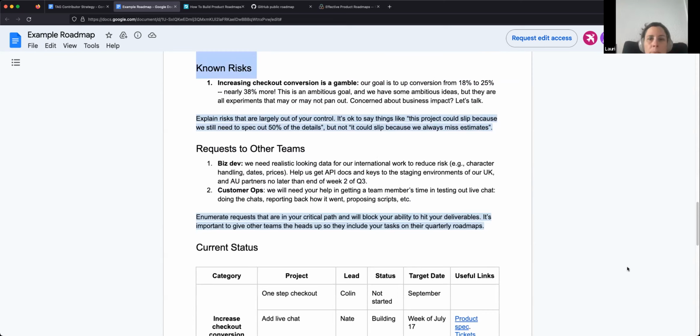So having something in the roadmap by the team to say, this piece of work is really important for us, but we know that there's a risk because the people who are working on it may have other things going on. Here's our backup plan to make sure that we still achieve the goal. We'll onboard other contributors so they gain the technical skills so that if somebody on the team working on this has to bow out, then we can bring in that new contributor.